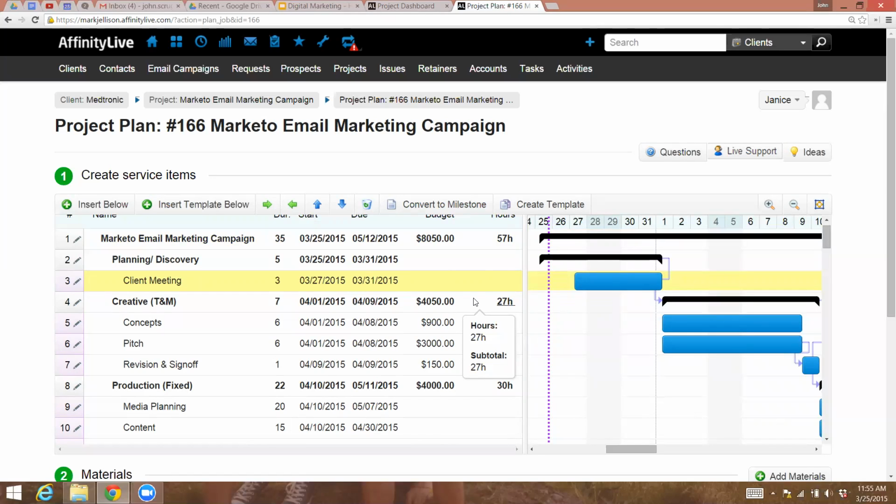So I think this is where we have a lot of trouble with retainer clients. We just track number of hours, and we'll pull quick time reports every month. For one-off projects that have like a flat cost, I think it's really hard to get visibility into if we're over budget or if we're under budget or whatever, because it's up to the account executive, or in this case, the project coordinator, to raise their hand if they think that we're spending way too much time on a campaign, and that rarely happens. Mm-hmm. So, yeah.